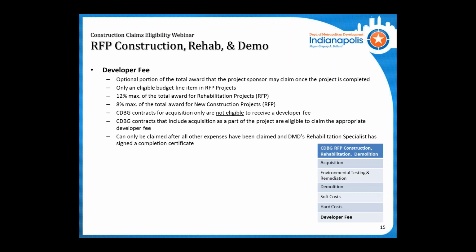Another thing we'd like to point out is the developer fee line. This is an optional portion of any RFP award that the project sponsor can claim once a project is completed. This is only eligible for RFP projects. It's a 12% max for rehabilitation projects and 8% max for new construction projects. And any CDBG contracts that are for acquisition only will not be eligible to receive a developer fee.